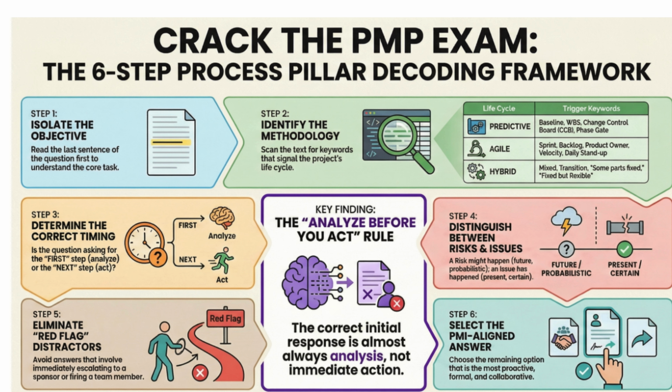Yeah. Let's take an example. Say you get a question about a new regulatory hurdle on some complex tech project. Okay, so the main process is risk management, right? You're identifying and analyzing this new threat, but your response might mean you have to procure some new safety equipment. Which triggers procurement management. Right, and because the contract is now changing, you have to use integrated change control to formally approve that amendment, which then, in turn, updates your cost and schedule baselines. So now you're in cost and schedule management.